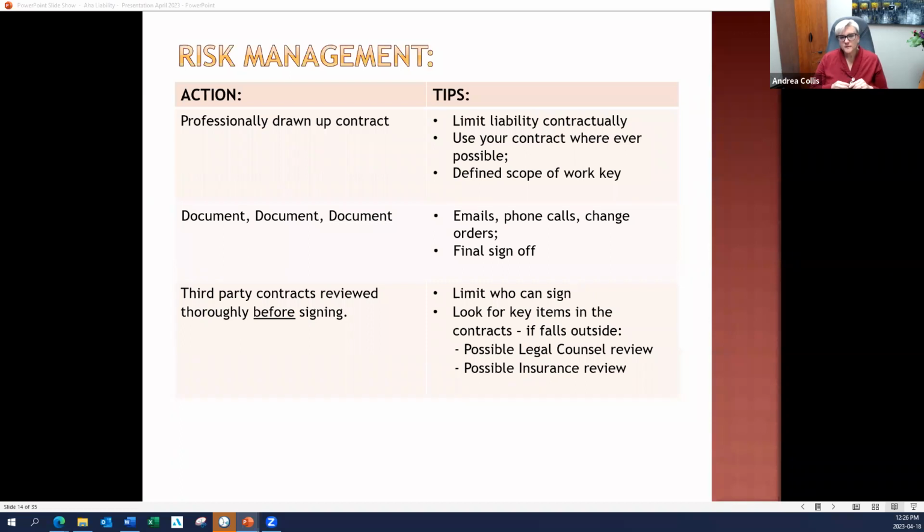You'd be surprised the number of times that I hear from a client after they have signed the contract and they need the certificate of insurance, and I send it over to them and they're like, oh no, this won't do, it's failed. They won't pay us. We've already done the job, but we needed insurance at different limits. And so this causes a lot of issues, obviously.